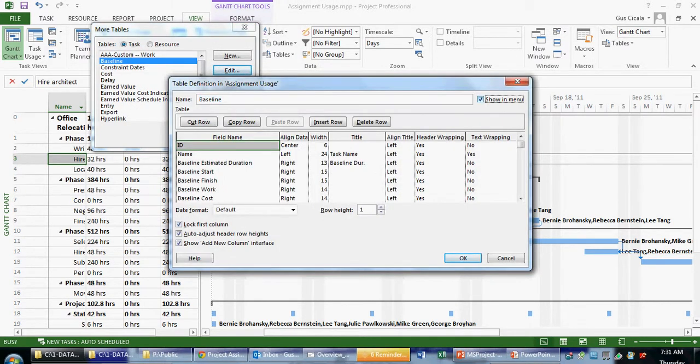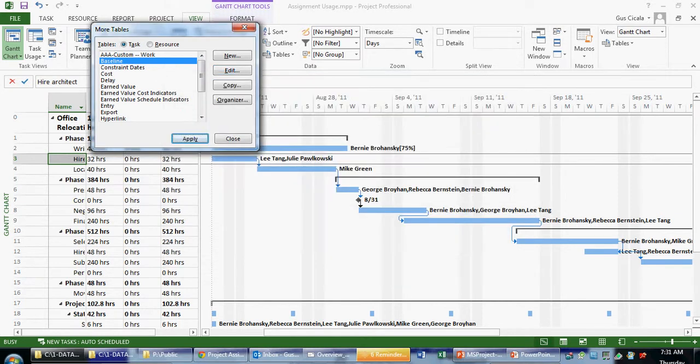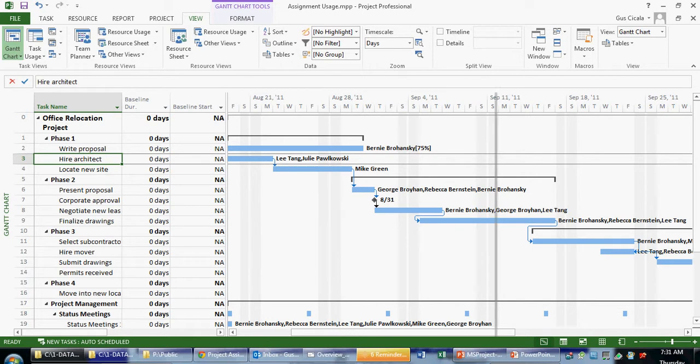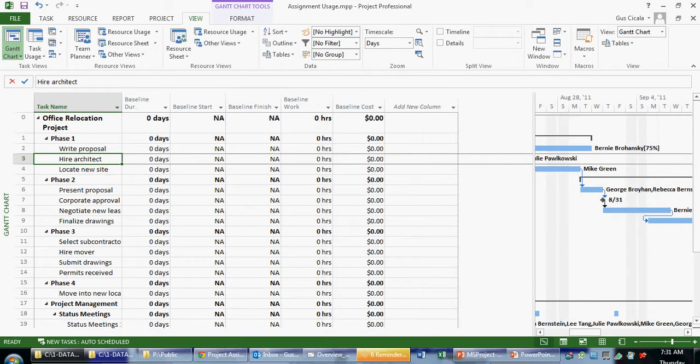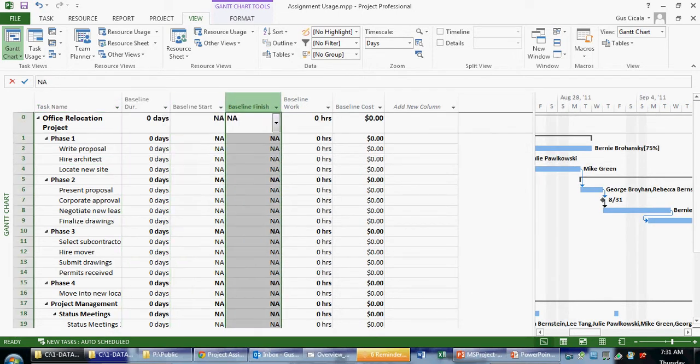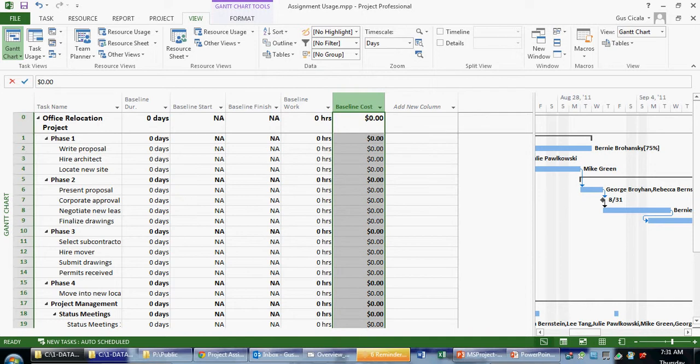If I edit that table, I can ask it to show in the menu, which I would recommend. I apply that table. And now I can see, when I move the divider over, that all of the baseline fields are uninitiated. So this is an indication that this plan has not been baselined.